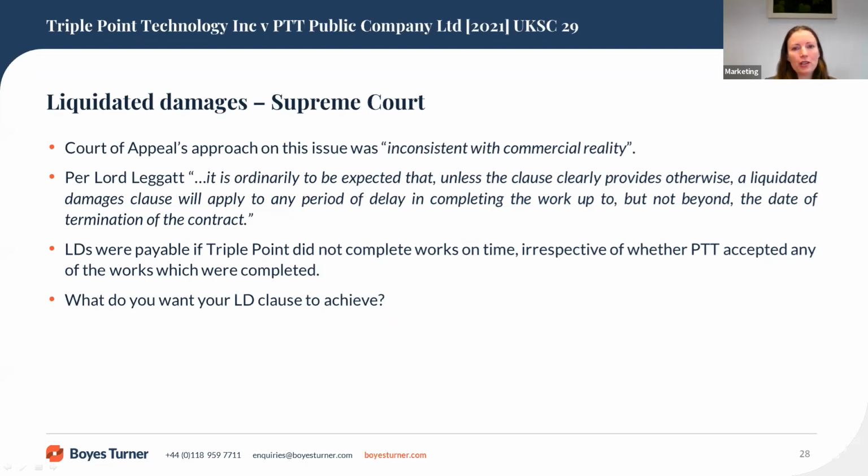Subject to the particular contract wording, if a right to liquidated damages has already arisen, that right will usually be preserved on termination. The liquidated damages will be calculated up to the termination date, and beyond that point, it will usually be open to the employer to claim unliquidated damages for delay, assessed in accordance with usual principles, but subject to any limitations or exclusions that might otherwise be in the contract.